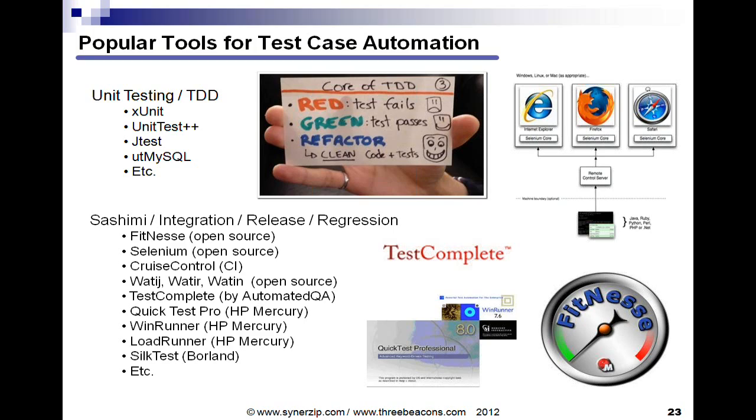In an Agile world, the developers all know just by how Agile is structured that quality begins and ends with the developers, and it has to be baked in. And the way it's baked in is adherence to definition of done, doing vertical slices a few at a time, and using these unit testing type tools. So, clarification, unit testing is by developers.